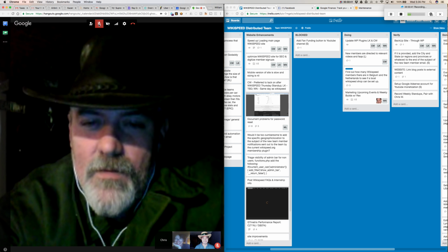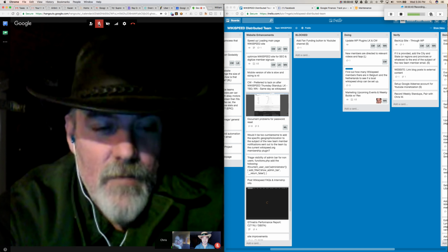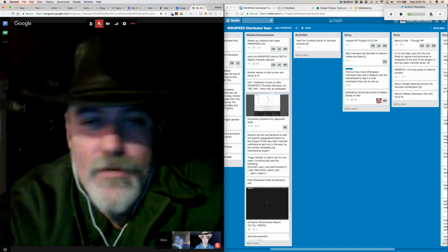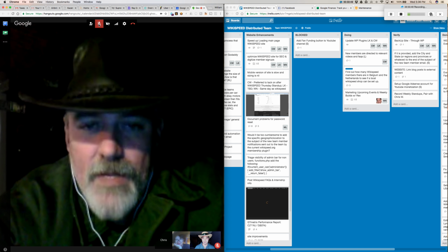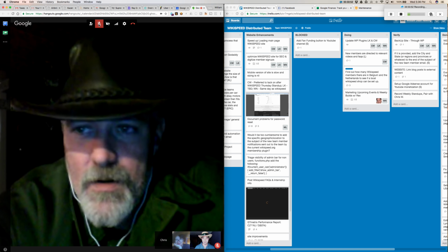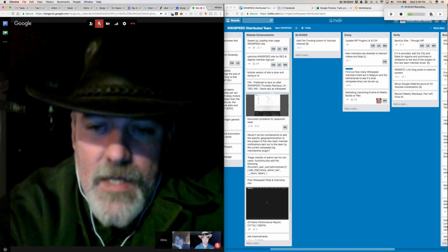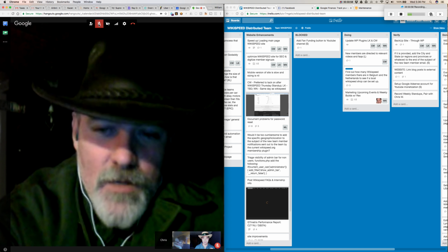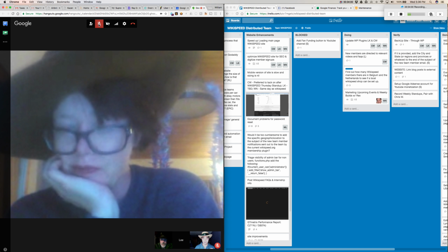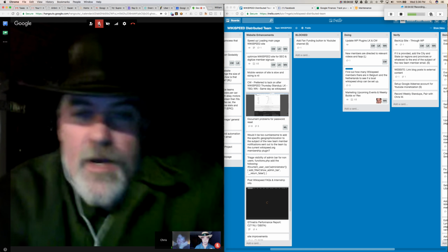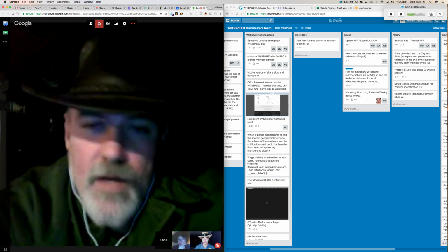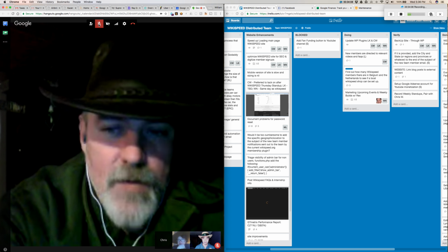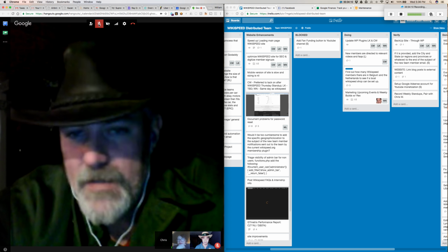So again, what William was saying, you're right. A lot of the job postings say you may be a Scrum Master for 4 up to 8 teams. But a really good Scrum Master is great on one team because they're dedicated 100% of the time to removing blocks and coaching the framework for that one team. When you're split up, you're basically creating a bottleneck, and you're the block now, because you're meeting with this team for their impediment while this team over here has an impediment.